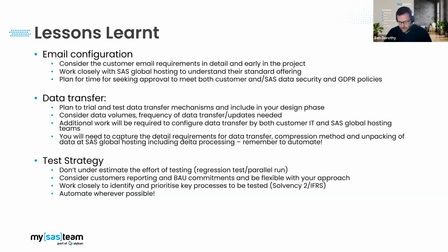And often you have to seek approval from both the client and SAS data security and GDPR working groups, and that can be quite time consuming in any organization, really, going through those governance processes to expose secure connections between organizations.